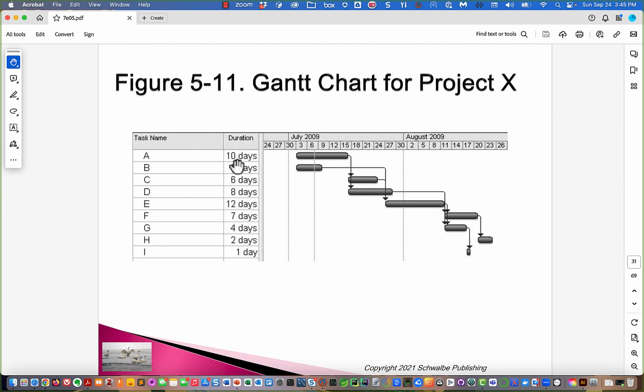We know that things go wrong, and we know that people rely on promises, and so we ought to have some kind of a buffer. Okay, how much buffer we ought to have has to do with how big the project is. If this is a project that looks like it's going on for 2 months, well, we can't have a 2 month buffer on a 2 month project. They're probably not going to accept that. But could we have a 2 month buffer on a 5 year project? Yeah, maybe we could. So the bigger the project, the longer the buffer might be.